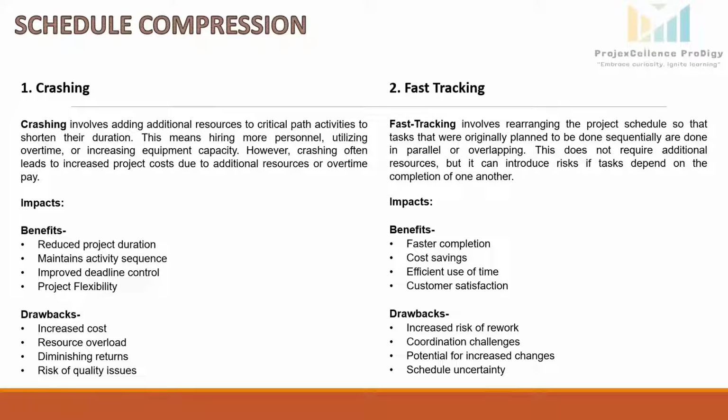So instead of waiting for the completion of the structural framework for the entire building before starting interior work, the team will begin to work on the interiors of lower floors while the upper floors are still being constructed. Mechanical, electrical, and plumbing systems are typically installed after the structural work is done.